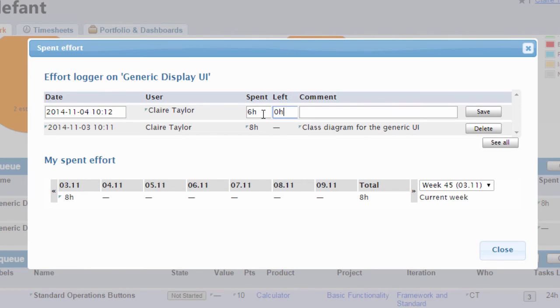This is common in Agile because you can estimate an effort, but you may go longer or you may go shorter on the estimation. And that is the whole idea, and also what the tool can track. It can track how much time you initially estimated, how much time you have spent, and how much time you still need to finish. And this can change daily.